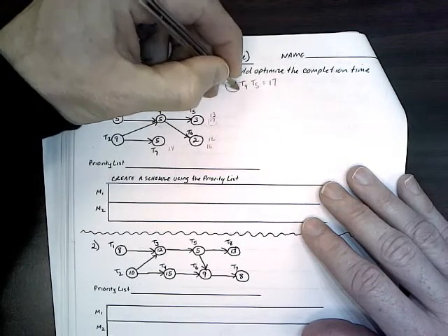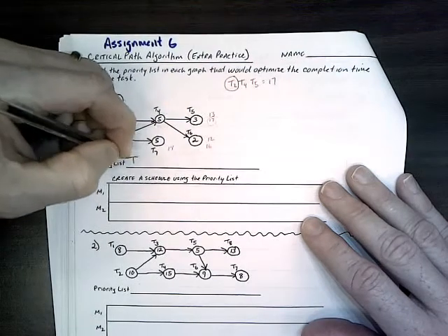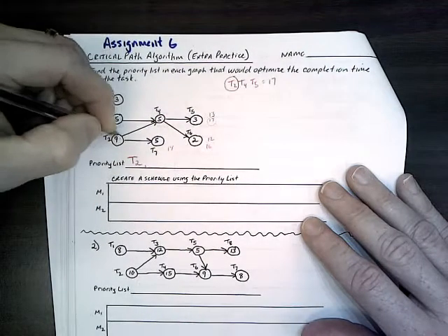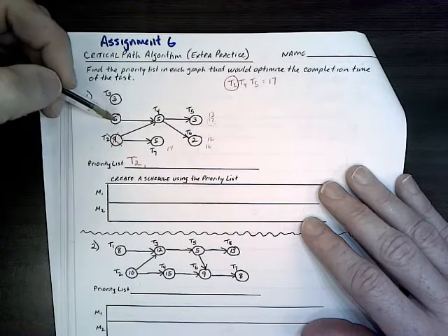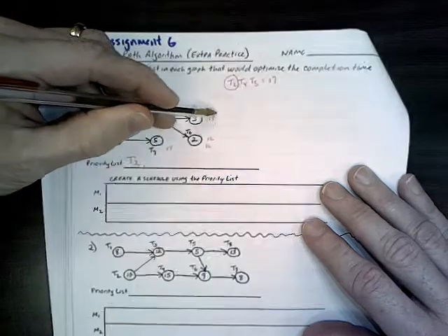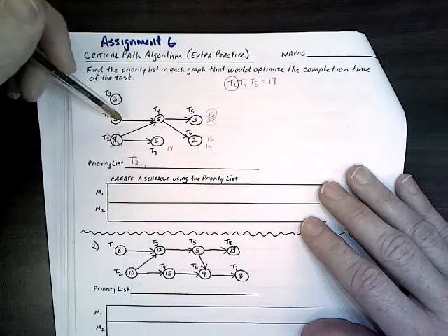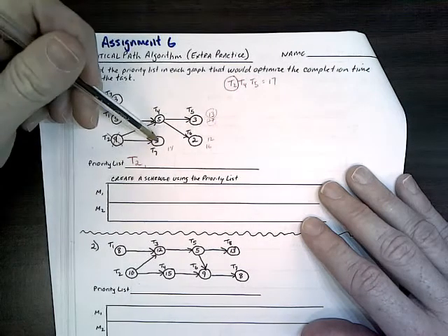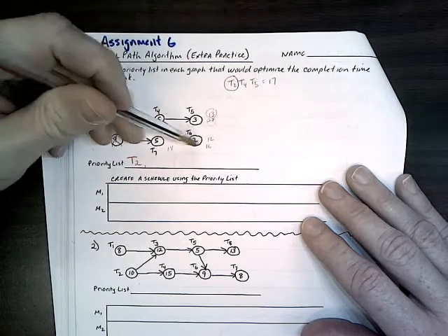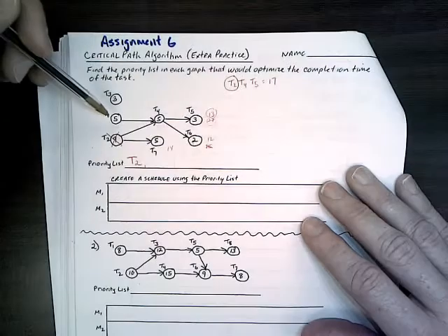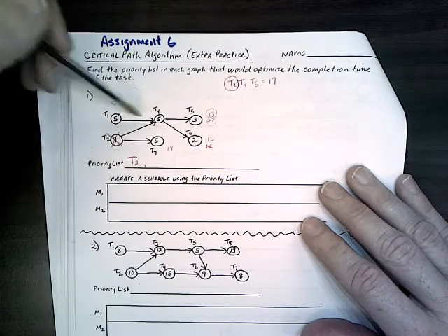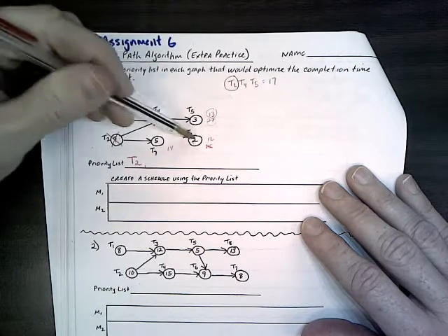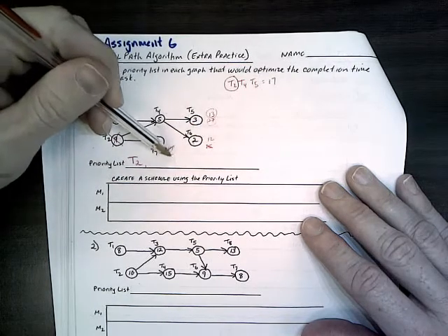We take the very first task from that list, and that goes first in our priority list. So we remove that now. That 9 is no longer there. Now we have 5, 5, and 3, so we still have the 13 in play. We have 5, 5, and 2, which is 12, and then 5 by itself is just 5.